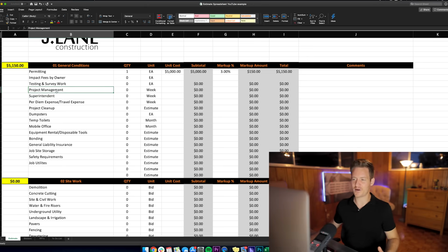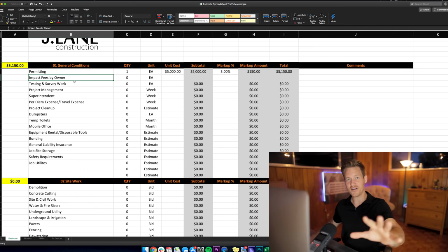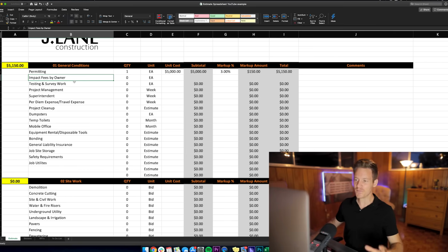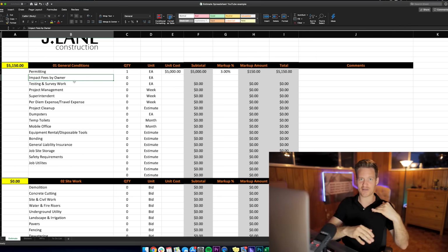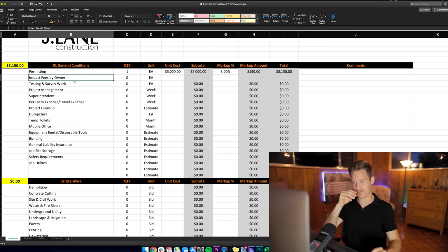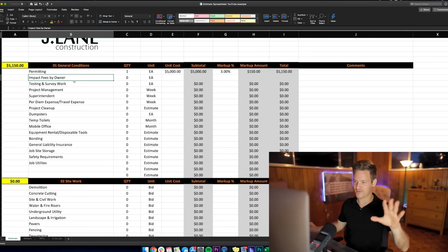And permitting, and typically I like to have the impact fees, if any, or tap fees by the owner. So I'll have the owner supply or pass through, or sometimes I'll just have, hey, you reimburse me for the tap fees. I'm tapping into the sewer or whatever it may be, or impact fees if you're doing like a ground up by a road or whatever it may be. You're impacting the, whatever. So that's a video for another time.